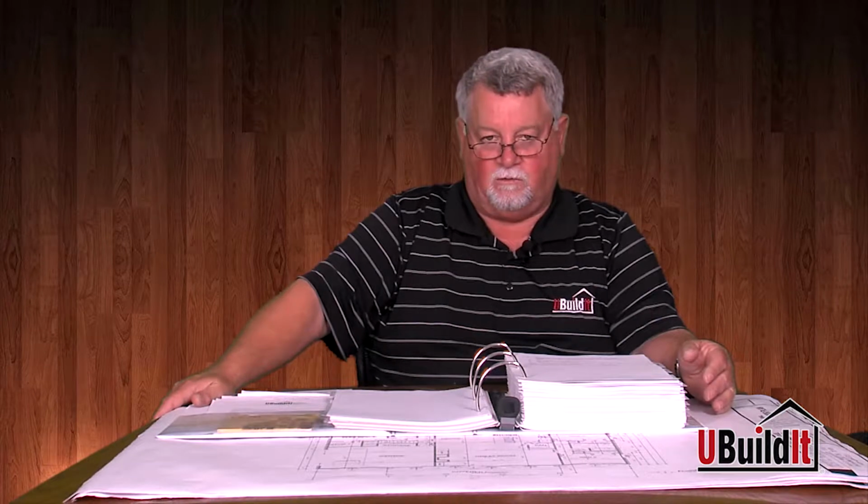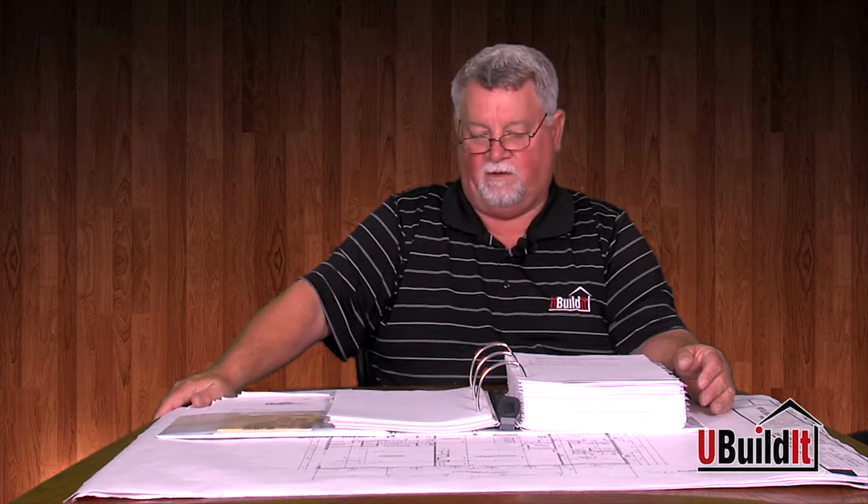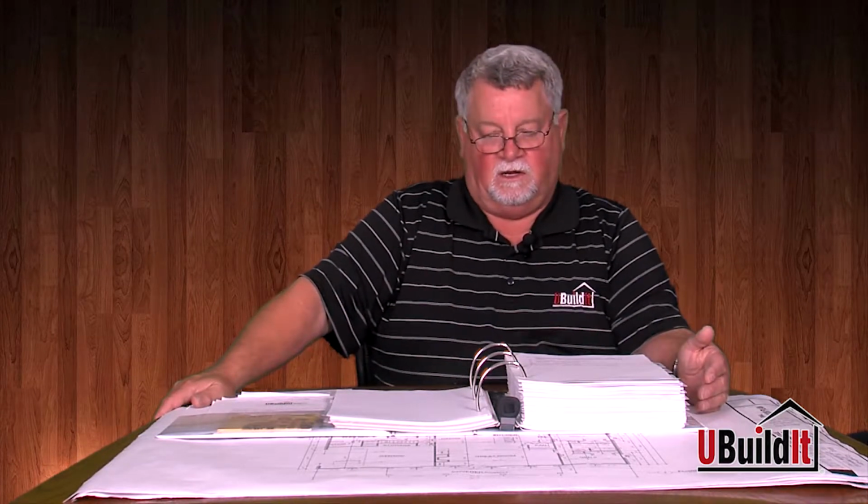After that, we're going to call you back into the U-Build-It office for our stage 2 meeting, where we review your budget. We'll review everything that happened during stage 1, and then we will go over the stage 2 flow chart. We like it to come back into the office because we have a controlled environment. We can sit down at a table. We're not out in the wind or the cold on the back of a tailgate trying to conduct a meeting like that. Also, conveniently, the beginning of stage 2 is where they owe another 25% of their money. So advise your clients to bring their checkbook.